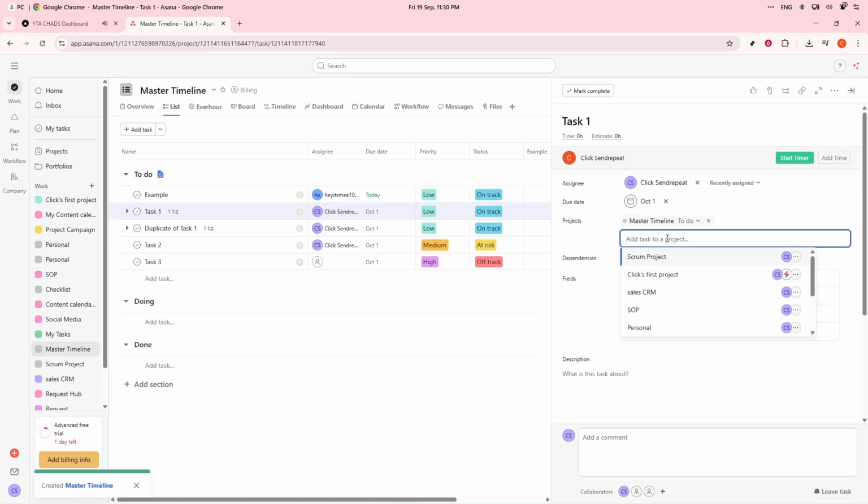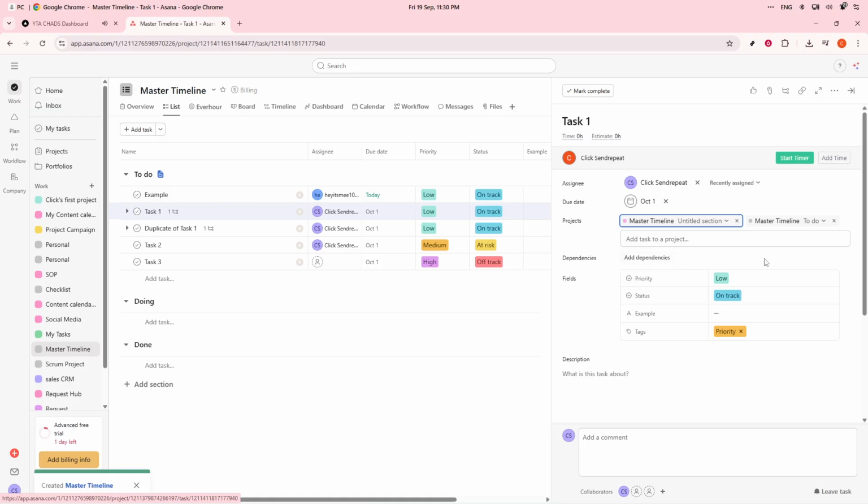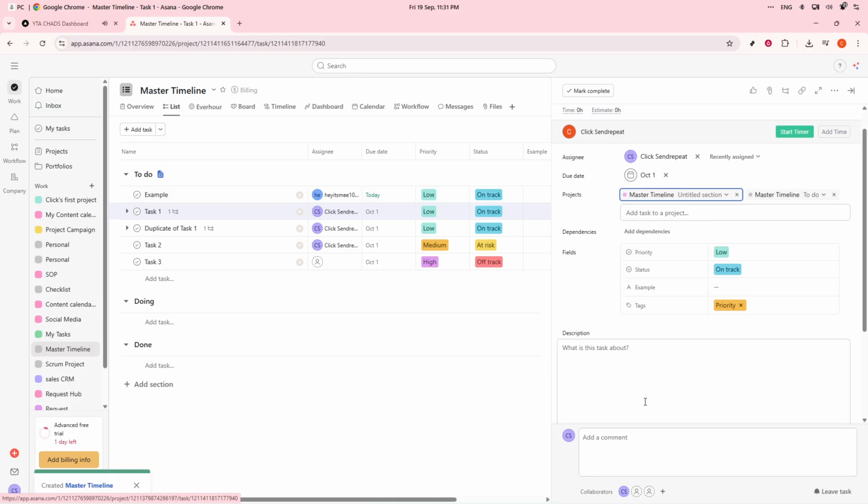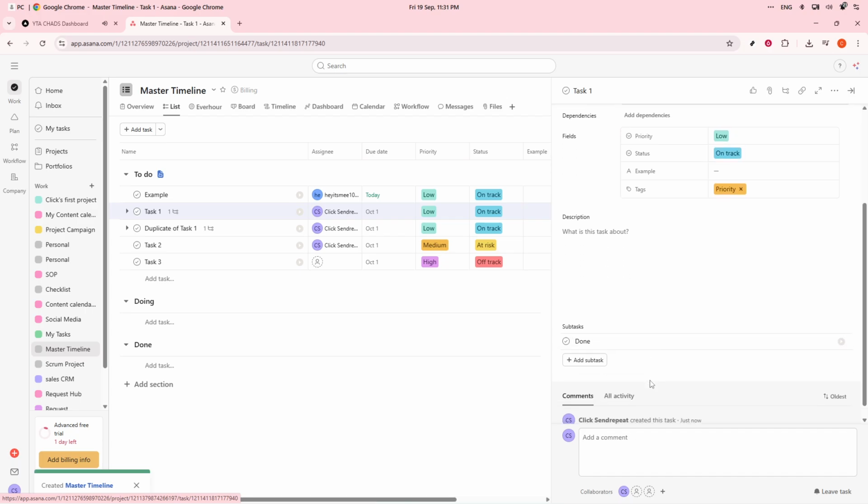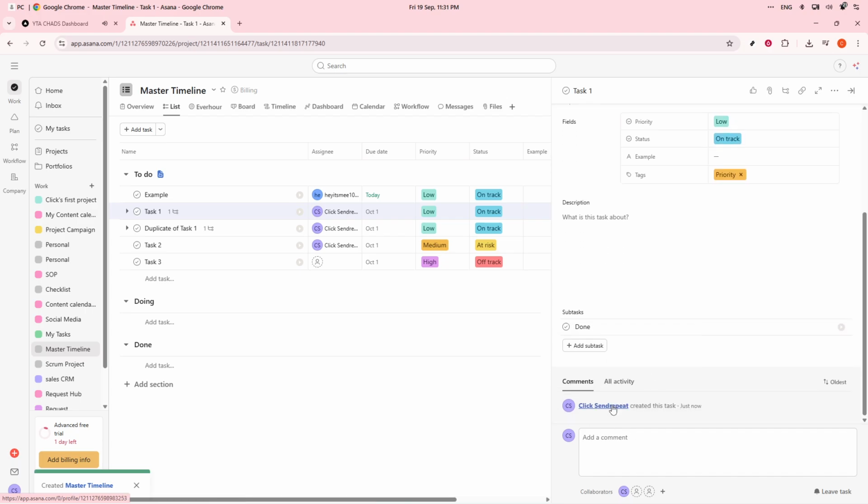Additionally, for more precise timelines, you can use dependencies. To do this, select a task and click Make Dependent On. By linking tasks this way, you'll clearly see which work must be completed before subsequent tasks can begin. This is invaluable for avoiding task overlaps and ensuring realistic scheduling.